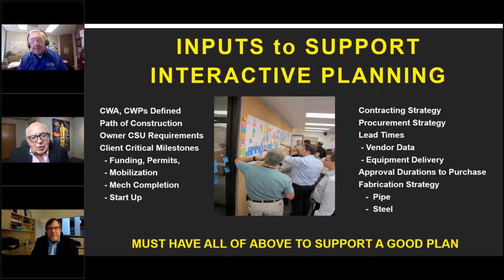We need everybody to work from the end backwards, to pull backwards. Yeah. Because pulling backwards allows people to specify what they need in order to start that work. And that then becomes the tag in front of it. It would be very unlikely that we would allow people to try to meet in Utah and drive a golden spike.